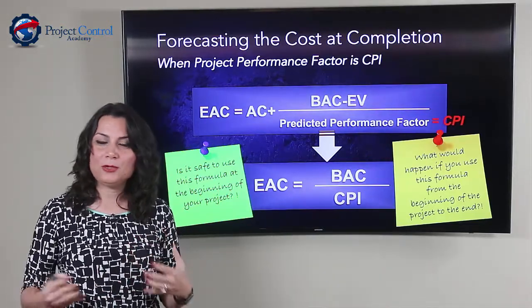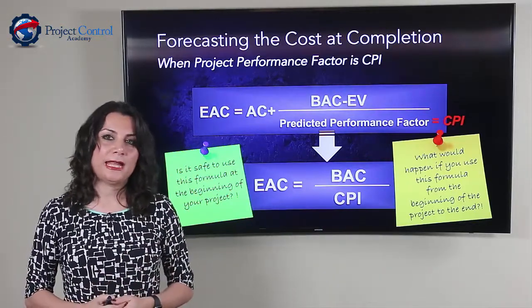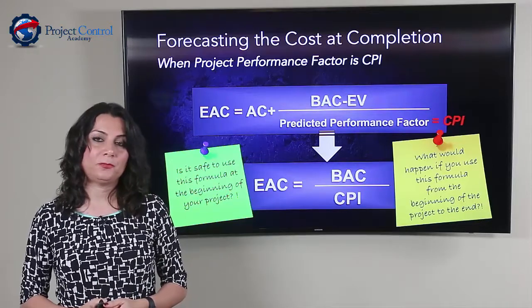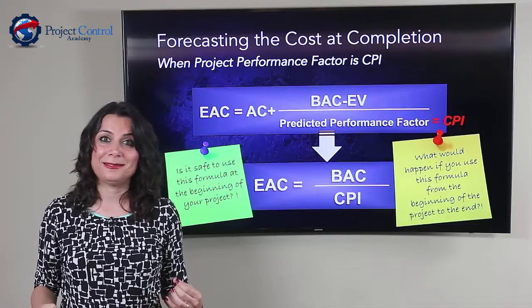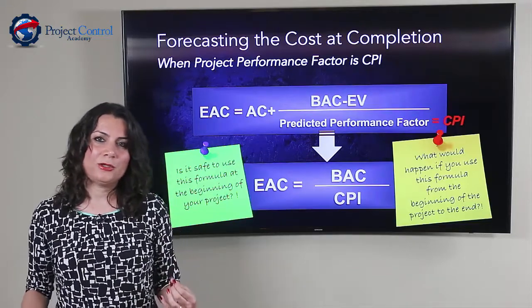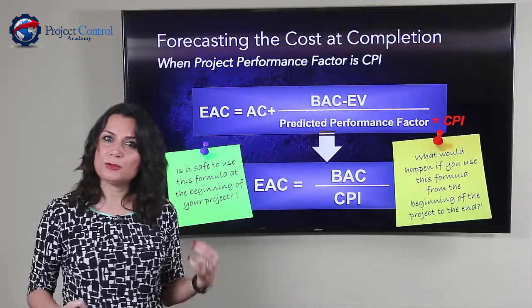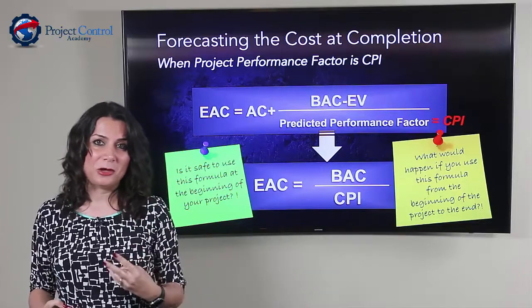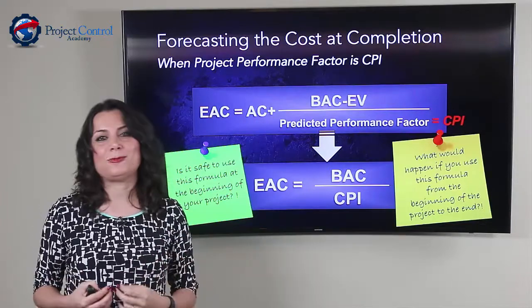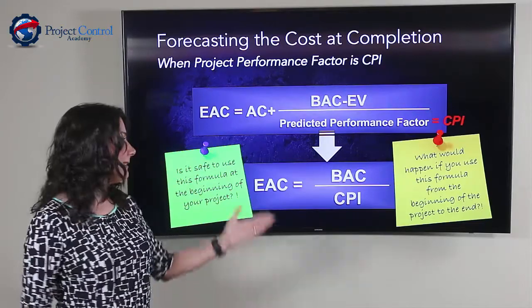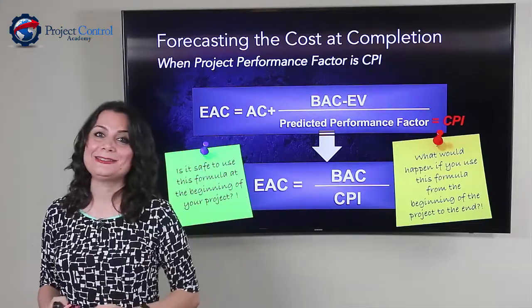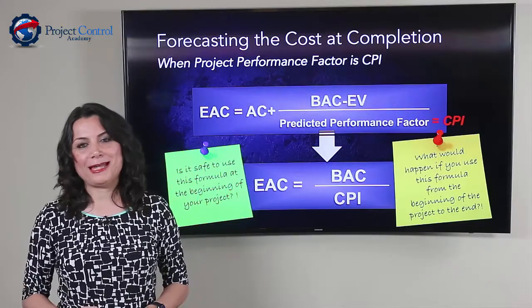It was below 20% progress on that project. And that was the time that the client came back to us with a big question mark. You are telling me that I need 2 million extra to finish this project, and you just started this project. So what's going on? And the answer was simple. That's the formula you mandated us to use for cost forecasting.